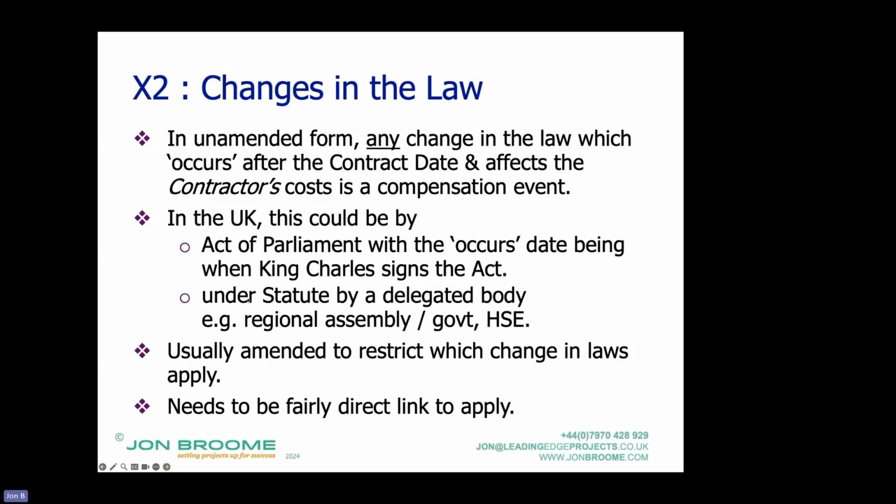It's usually amended, because it covers any change in the law. It's usually amended to restrict which changes in the law apply, and there needs to be a fairly direct link. So contractors have wanted, let's see, I'm going to make this up, an act related to supplying arms to Ukraine or sanctions against Russia, causing cost inflation somewhere in the world, and wanting that to be entitled then to an additional cost compensation event.